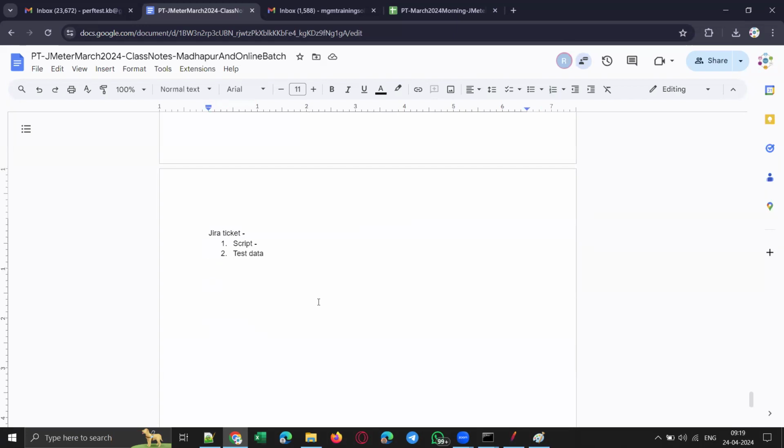by the way, by the end of the day, you need to send a status report as well. Daily status report, that is called DSR. Because your manager needs to consolidate all the status and give an update to his reporting manager. Your manager also will be reporting to someone, right? So daily, before you leave the office, you are supposed to share the daily status report. What did you work on that day?